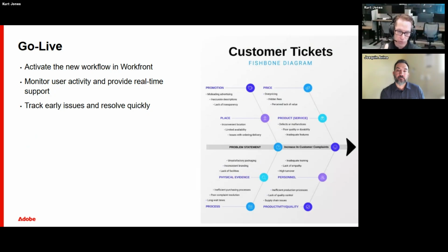So you go through your survey and see, hey, I got stuck on the intake process, or somebody says, I went all the way through, but then on the submission part, I had issues. For a fishbone, maybe one of your topics is intake, another is submission, and you're identifying from your issues, your tickets, and your surveys where people are struggling.